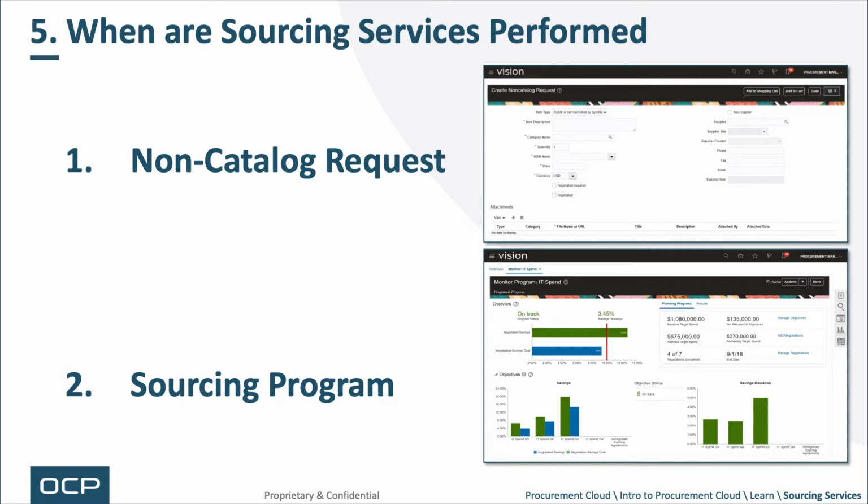Topic number 5, when are sourcing services performed? Well, there's really 2 initiators to sourcing services. First is that you've searched for catalog content, can't find it. You are now going to do a non-catalog request, meaning you can't find catalog or pre-negotiated content. So obviously that would spawn this sourcing service to find the supplier, the content, the price, the terms, etc.